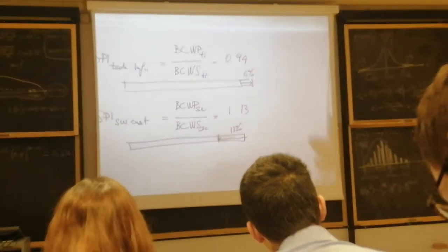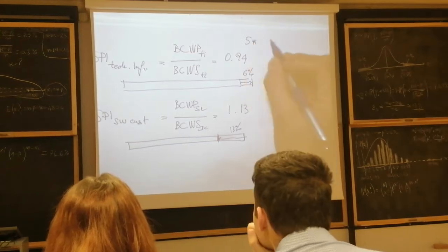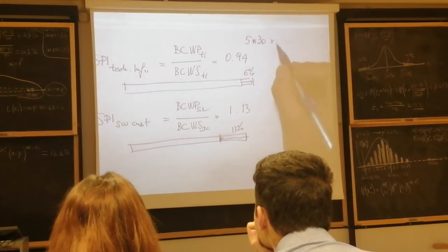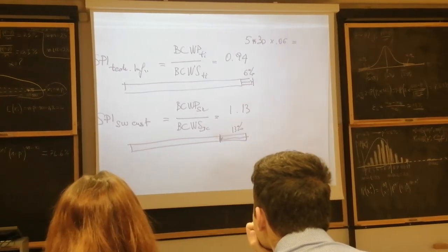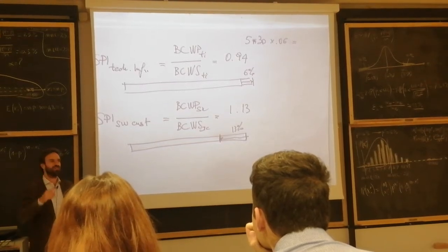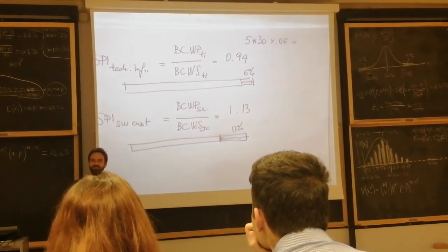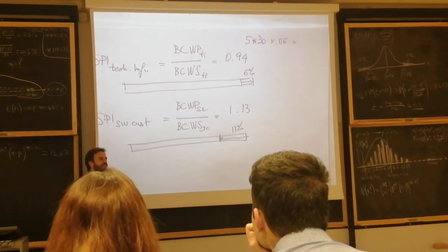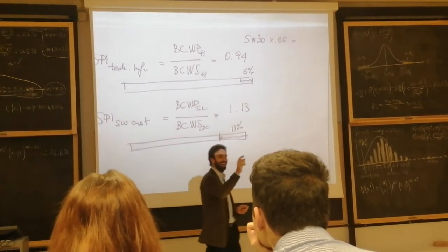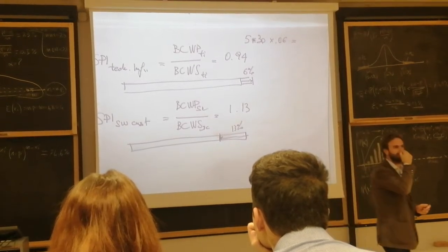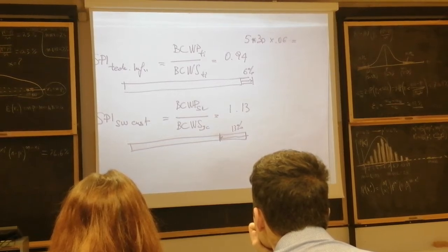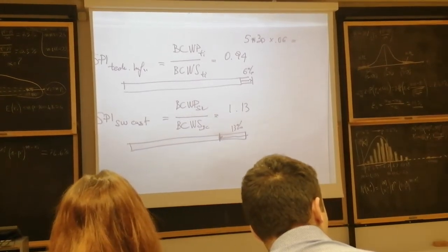It's 5 months times on average 30 calendar days each times 0.06. That's about 9 days. Okay? Make sense? So far, this is the accumulated accrued line on the task. Yes, please. Yeah, you can use work days, but you know that elapsed days and work days can be converted.